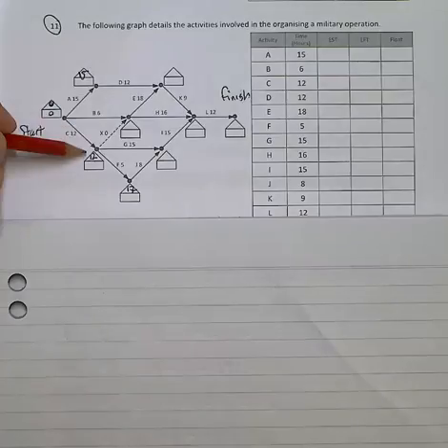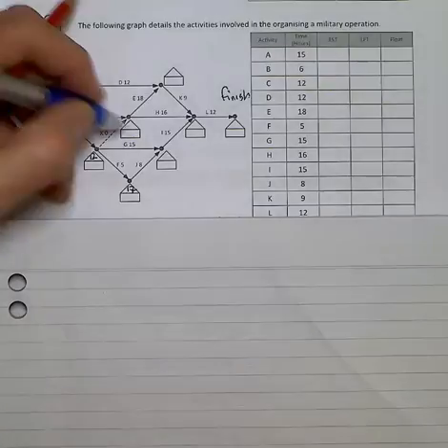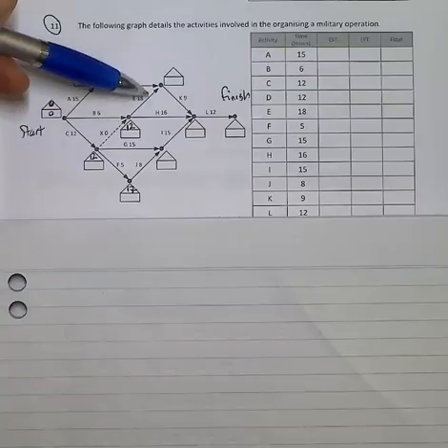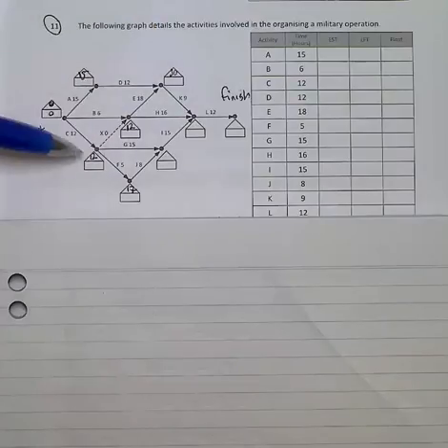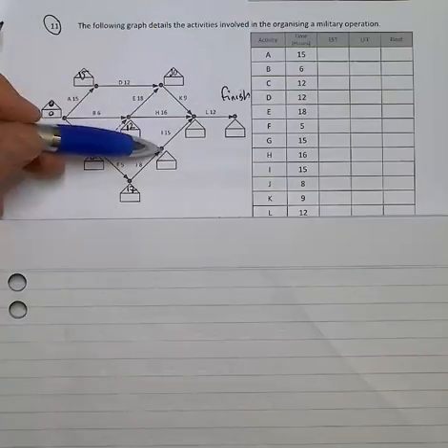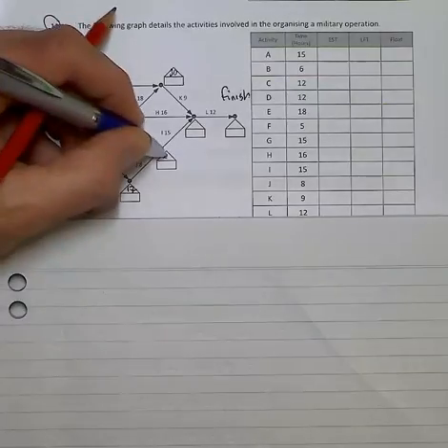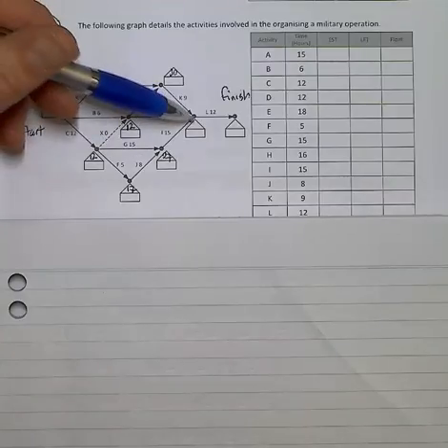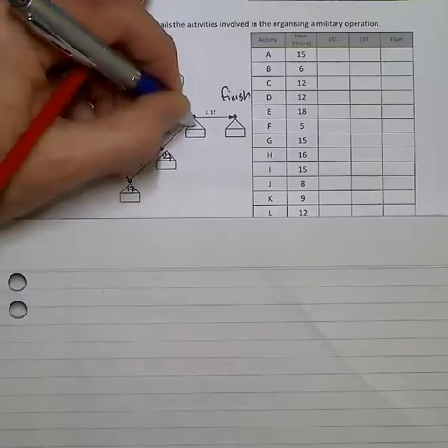Now please notice here we've got a dummy edge, and whilst that may not take any time, we've got to consider other contributing factors. So it looks like 12 is the only option in this instance. I've got 12 and 18, which is 30, or I've got 27, so I'll go 30 there. Now in this lower branch, I've got a choice of an addition of 13. I've got a choice of an addition of 15, which will give me 27. Moving on, well that can only be 32 or 28, 42 or 28 I should say, so 42,